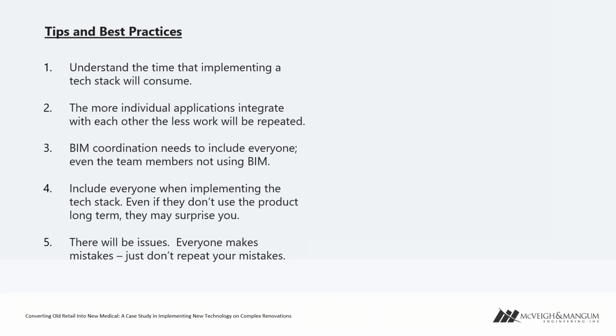The other thing is make sure that the BIM coordination includes everyone, right? This is where your project managers, your QA, QC, the fire protection, these guys that aren't inside of Revit or Navisworks. We have to make sure the project teams are including everybody. It can't be this BIM group that does it and then comes back. So leveraging things like BIMTrack, allowing them to push it to a web platform, sort through it, and see who's still responsible for their tasks is very key.